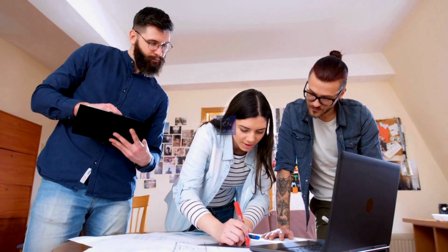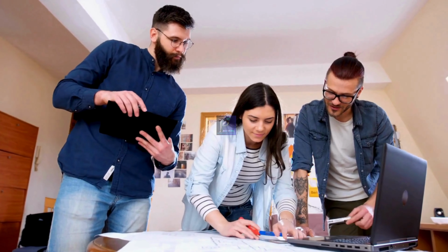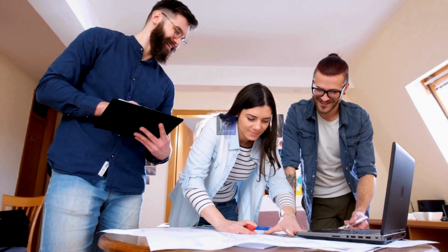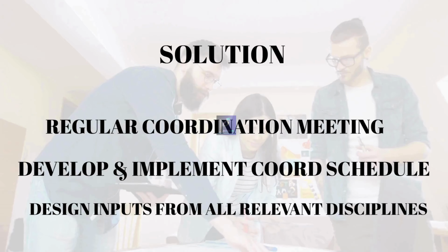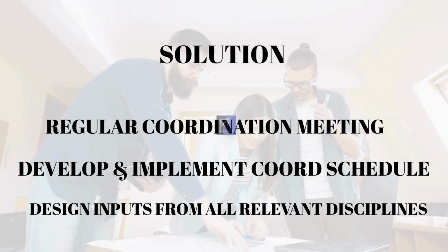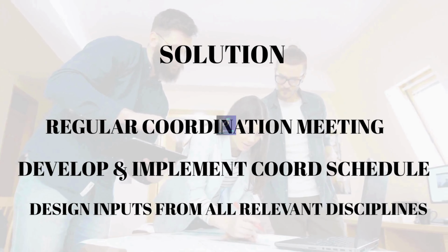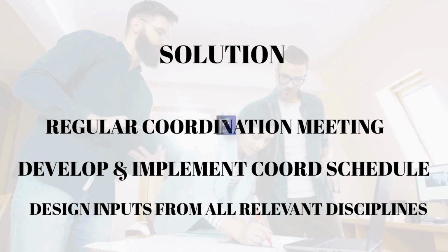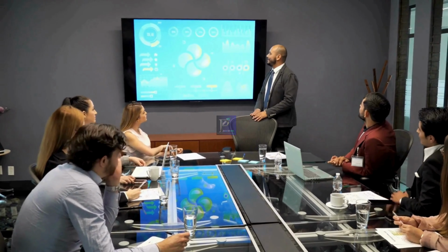So the solution is to prepare detailed dynamic sequencing plans with built-in buffers and real-time updates. Always confirm the sequence with contractors before starting each phase. Implement a clear coordination schedule. From experience, like the Hyderabad Metro project, I have seen how tough it is because the environment is constantly changing. Delays do happen, but the team responded diligently thanks to the proactive efforts of the PMC, who ensured all contractors coordinated, shared inputs, and revised their